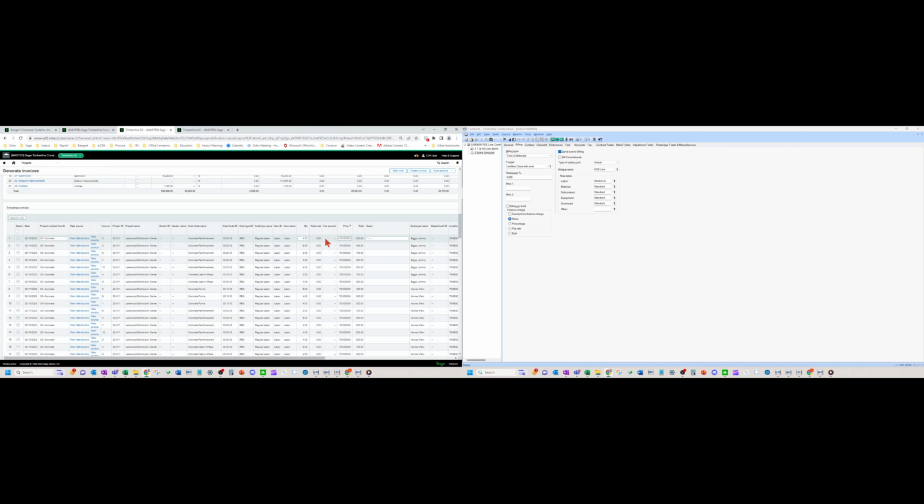But let's say I don't want to bill this, or I don't like that it's 75 and I just want to quick change it. All you got to do is type a change in here. Okay. And in 300, I'm going to show you the process to do this. It is not this easy. You have to regenerate WIP. You have to reassign the rate table. Also, if you have it across a fiscal year where your rates change, you have to go in and assign new rate tables. Okay, so a lot more complicated and a lot more difficult in 300, still doable, but it's a little more difficult. Okay, so really, really nice.